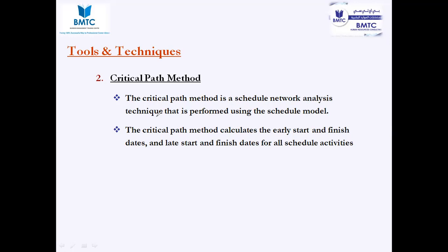As a project manager, it is your responsibility to make sure that your planner develops a schedule network diagram with only one critical path. There should not be multiple critical paths, because that would be very risky. If the network diagram shows more than one critical path, you need to adopt some technique: add resources, crash it, fast track, or change logical relationships and dependencies. You have to make sure the schedule network diagram has only one critical path.